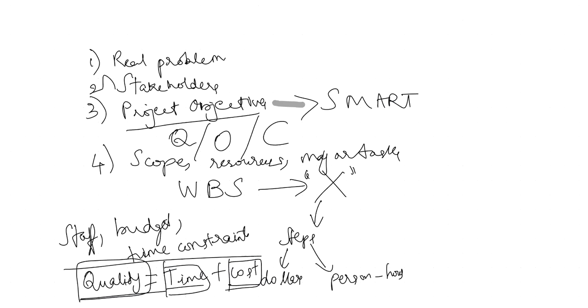If your time frame for developing a new database management system, as I mentioned, is suddenly cut, then maybe you need to employ twice the number of people, or end up with a system that isn't as robust as originally planned. That's because you have not considered the capacity planning, the availability planning, and the velocity of different resources, both from a cost perspective and from a people perspective. You have not done your due diligence. The bells and whistles get in the way of mission-critical activities, remember?